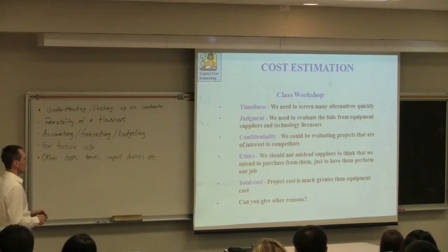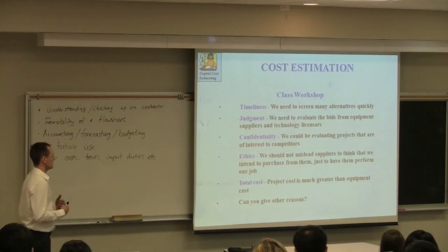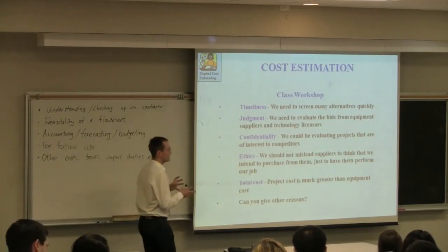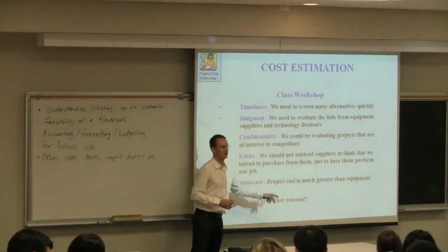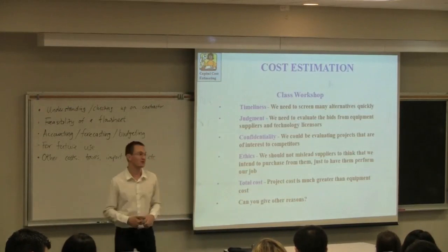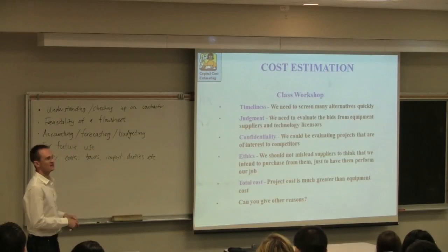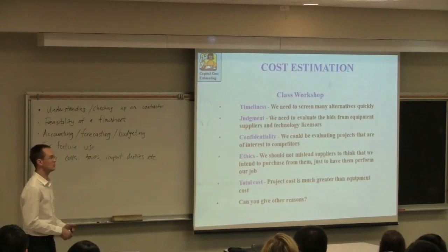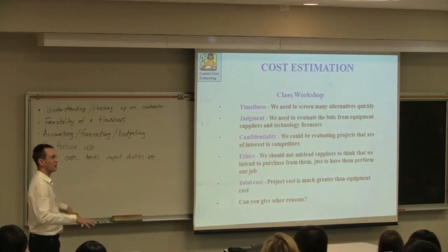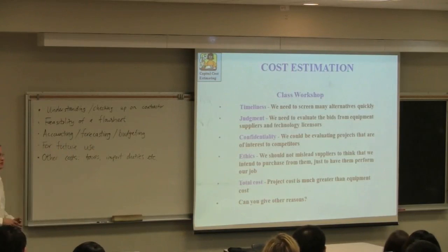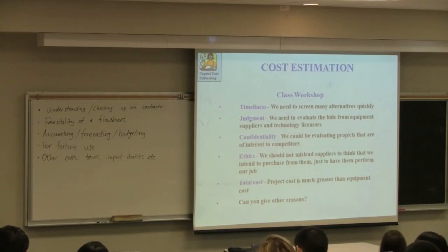So we would have a better idea internally of, it's not just the heat exchanger we're installing, there's piping going in and out, what the extent of that piping is, how many bends and elbows there are, what the racking and the height is around it, what the painting needs to be that's done to finish it off, any concrete blocks and supports and mounting for that unit. Those costs add up very, very rapidly. And as a result, the final project cost, just on one unit, as simple as a heat exchanger, is 3 to 5 times just the heat exchanger cost itself.